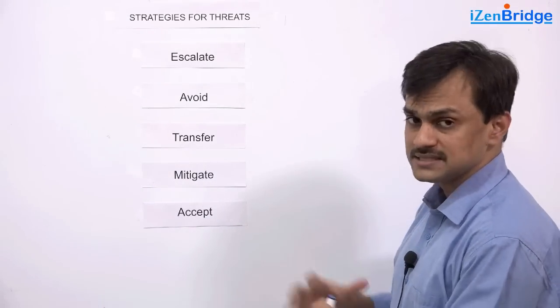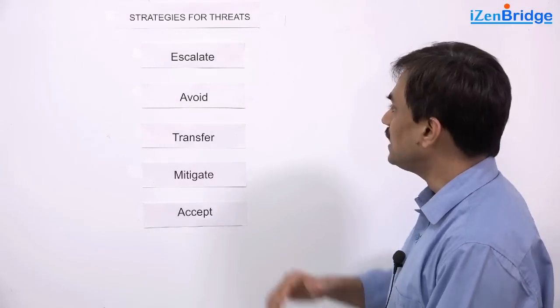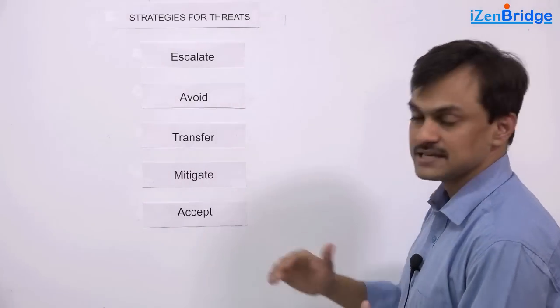In PMBOK Guide 6th edition, there are five possible strategies a project manager may look into and they are escalate, avoid, transfer, mitigate and accept.